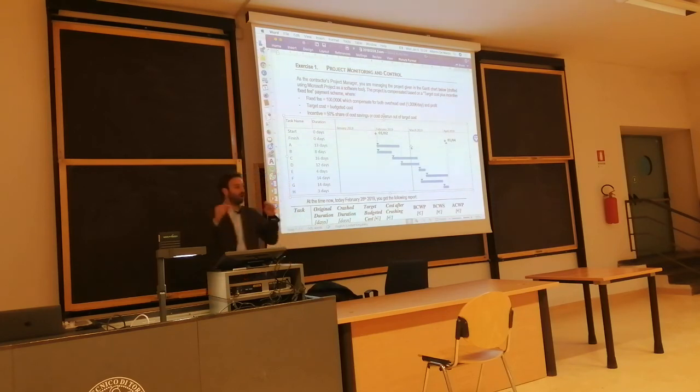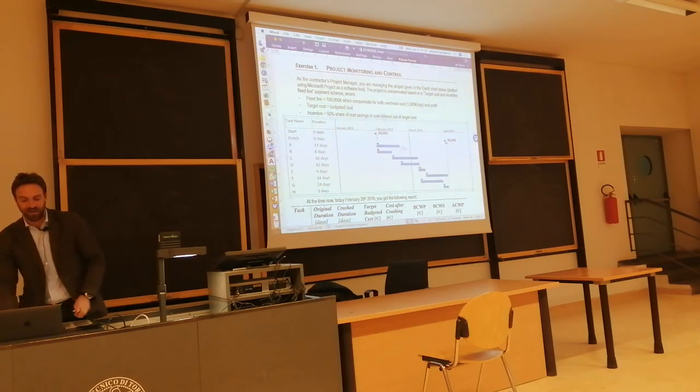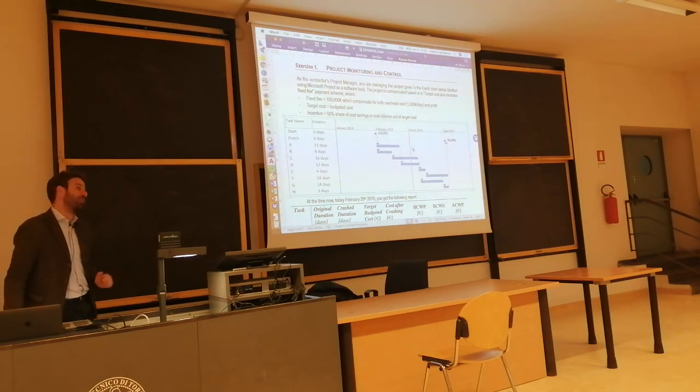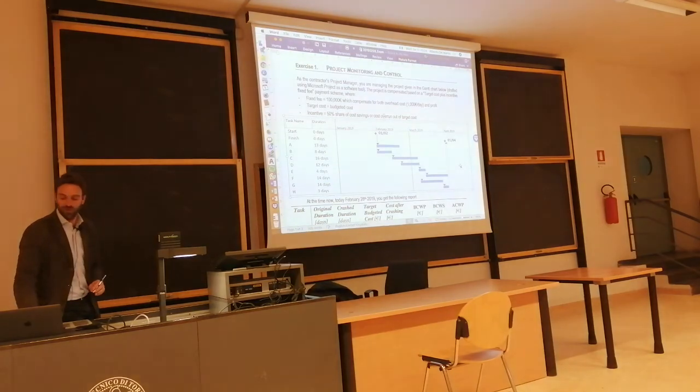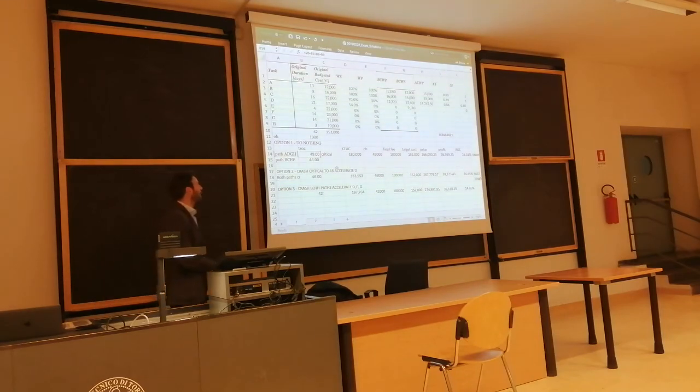So we are on time now with A, but in fact A was late in the past, and now it's on time because it's finished. That's my assumption. So I'm adding 7 days, which goes to 20 days, the number of work days in Microsoft Project for February. So the duration of A is 20. If I update this duration to 20, D would start tomorrow on March 1st. So the new duration of the project is 49 for the path ADGH. And what about BCEF?